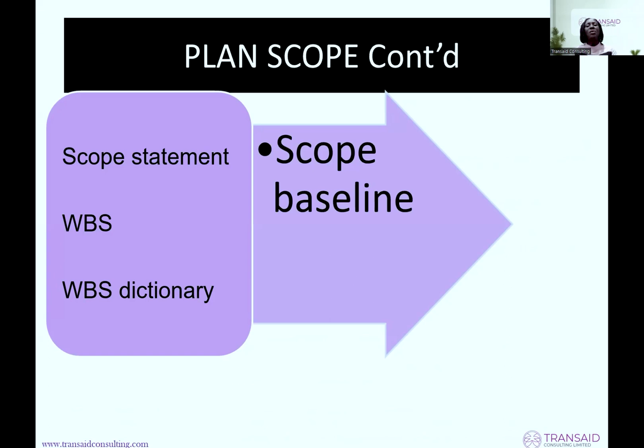And so you now define your scope baseline. A baseline is what is locked at a point. You say, this is what we agree. Once you define your baseline, any change to that baseline has to go through the change process. But before you define your baseline, they can just bring a change, and you look at it first.